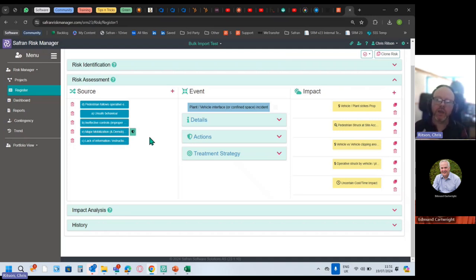So controls being those things that you are expected to do. Like, I don't care that you only joined the company 10 minutes ago. This is how we do business here. This control is how we mitigate that thing, right? It's expected. So we can audit you against those things. Whereas I see mitigation actions as those things that go over and above the control environment, which is how can we potentially spend more effort, more money, more time, more resource on improving the odds of delivering this project successfully.